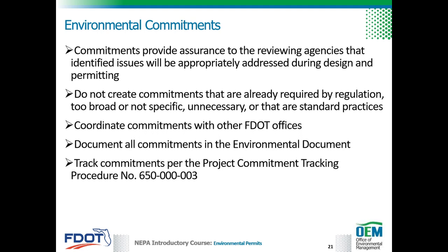Commitments developed during PD&E provide assurance to the reviewing agencies that issues identified will be appropriately addressed during design and permitting. FDOT should not create commitments that are already required by regulation, too broad or not project-specific, unnecessary, or that are standard practices. Be sure to coordinate commitments with other FDOT offices to ensure they are in agreement. Document all commitments in the environmental document and track commitments per FDOT's Project Commitment Tracking Procedure and Part 1, Chapter 22 of the PD&E Manual.